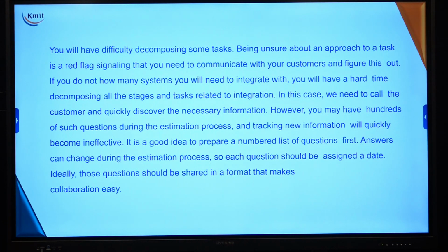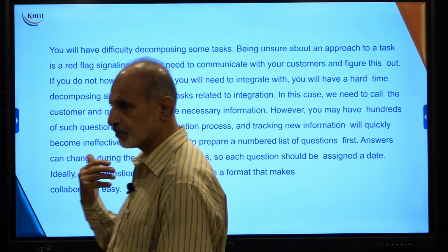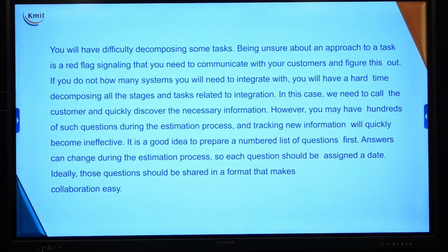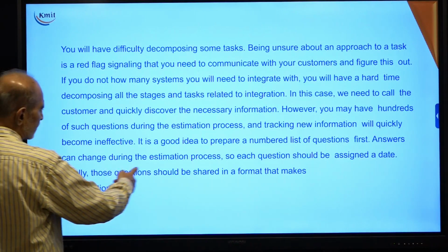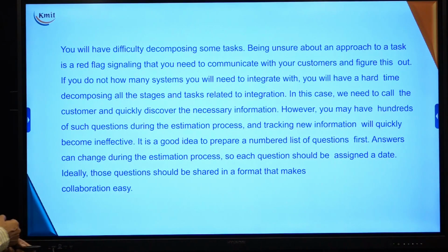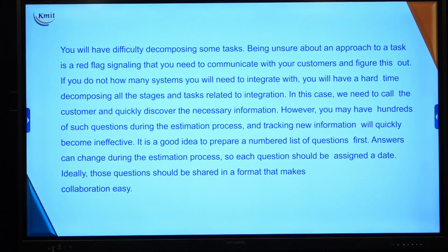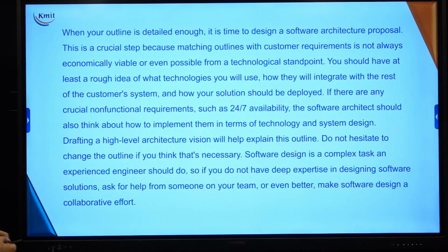So, the estimation process is a mind-boggling process because it requires revenue, it requires man-machine hours, and it requires so many unhidden parameters too. So, it is always a good idea to prepare a numbered list of questions first, and answers can be changed during the estimation process. Each question should be assigned a particular date and time. Ideally, those questions should be shared on a formal basis to make the collaboration easy with the customer. So, with this we can outline the detail enough for the estimation.